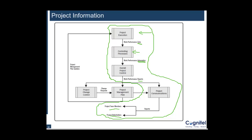Now, work performance reports might indicate that some change is required in the project. That would be taken up by the project change control process, a change request would be raised, and that particular thing would be changed in the project management plan, which would again go back to the execution team. Any updates in the project management plan need to be communicated back to the execution team — these are the changes that have been made, and you need to now execute as per the new plan. So the change in the project management plan generally comes from work performance reports or work performance information.